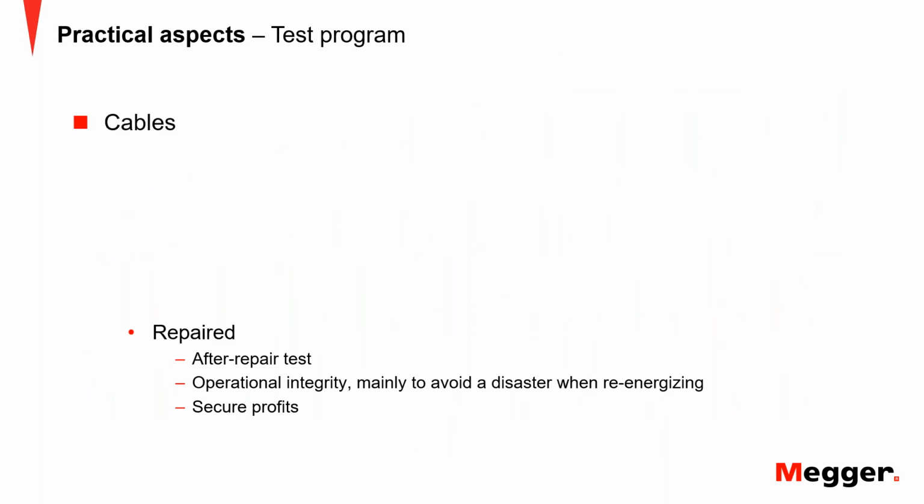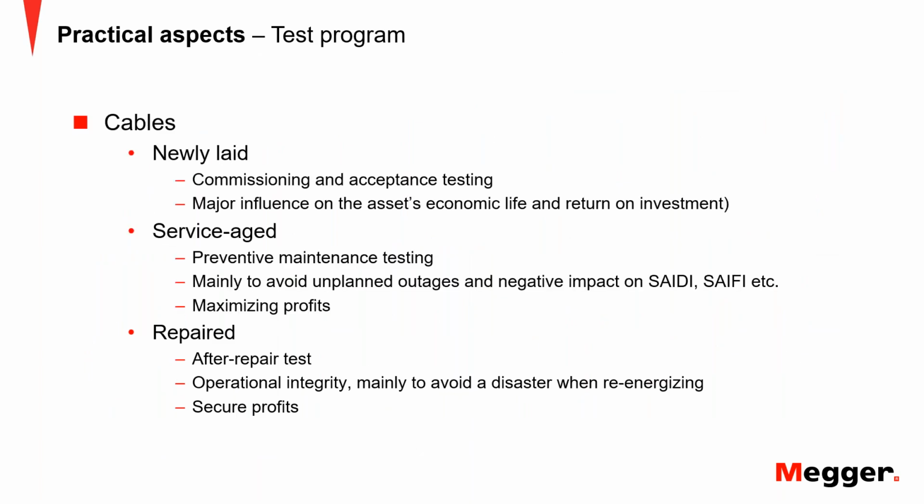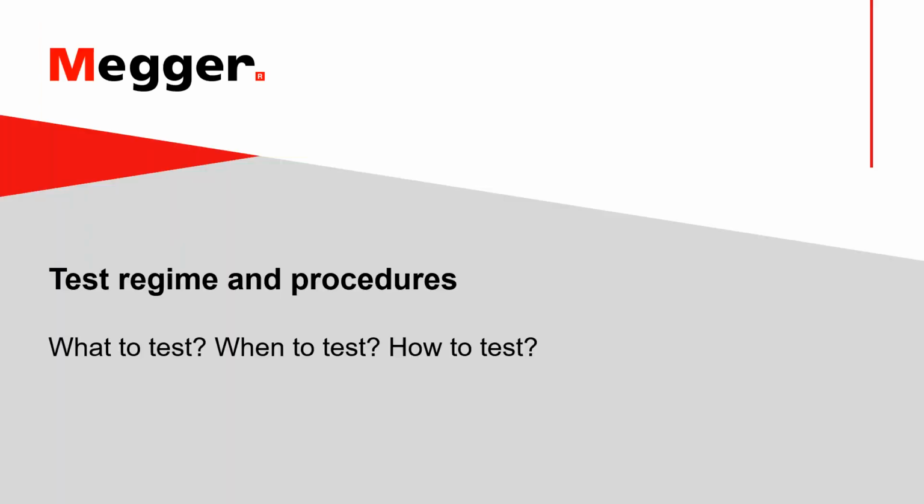Now, in terms of test programs, okay, so again, newly laid cables. On newly laid cables, commissioning testing; service aged cables, preventive testing; and after repair, as an operational integrity test. Focusing on commissioning testing now.